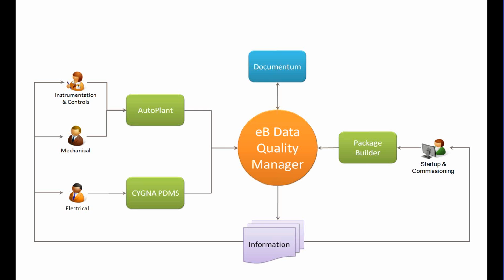And let's just say this took 6 minutes per circuit. Okay? To us, that 6 minutes costs about $10, right? We have over 25,000 circuits on this job. If it was just 25,000 circuits, automating that process of assignment would save the electrical group specifically approximately $250,000. And we have automated that process. And for the 29,000 some odd circuits, the assignment process is much more efficient than it was in previous projects.